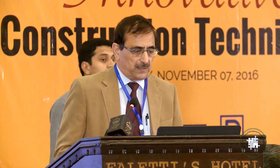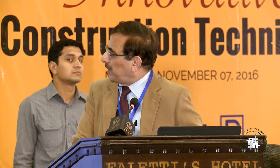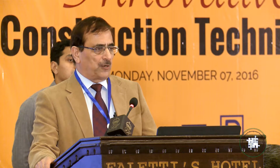The site is on the Sutlej River, on N55 near Lodhra on the road connecting Lodhra to Bahawalpur. The river is almost dry. There are three bridges at this location: two road bridges for incoming and outgoing traffic, and one railway bridge. We have selected this site and will build the rubber dam about 300 metres downstream of the road bridge. For this purpose we have completed topographic survey, geological and geotechnical investigation, layout planning, hydrological studies, groundwater investigation, environmental assessment, quality controls, and economic analysis.